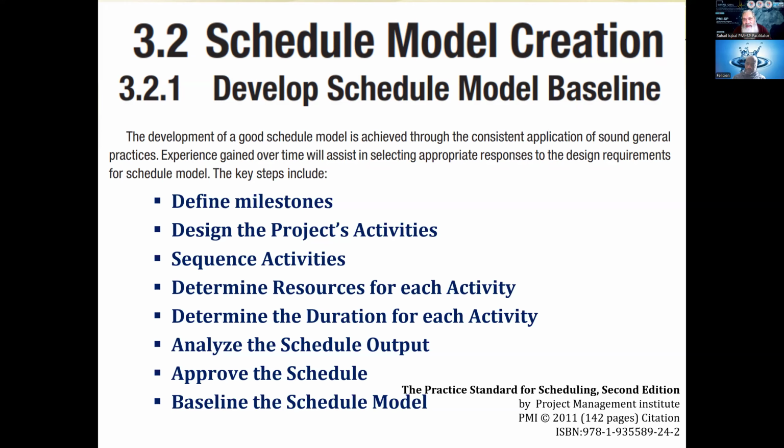All milestones are events, but these are not all the events. Some important events in the whole thing are determined to be the milestones. So definitely you can start with identifying the major milestones. Later on, you learn about a lot many events, and out of those events, maybe you consider some more events to be classified as milestones. You understand my point? Yes, sir. So once again, I would say every event is not a milestone, but every milestone is definitely an event.